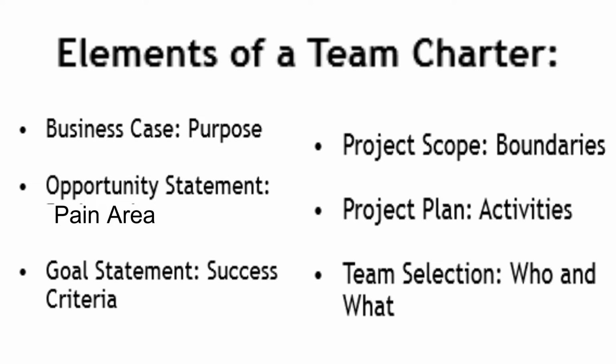So basically it's a sort of Gantt chart that describes when each phase of the DMAIC will start and when it will end. And as I said, it has to be a high level plan at a very macro stage. Minute details are not required at this stage in the project plan.